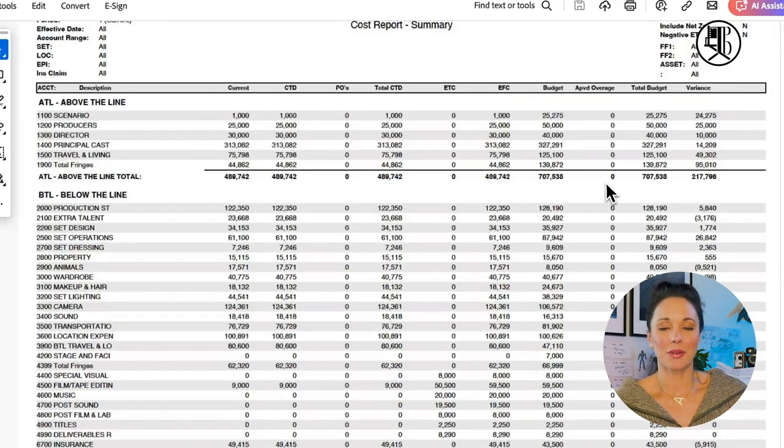We worked a lot. Our cast costs were not what we thought they'd be. So there was a lot of padding, like I said, and if you want me to delve deeper into budgeting for cast and so forth, there are ways to pad those lines. I purposely pad them in case I have an expensive cast member, and in case I have overages and certain things I try to anticipate, so I'll pad for that beyond the contingency.